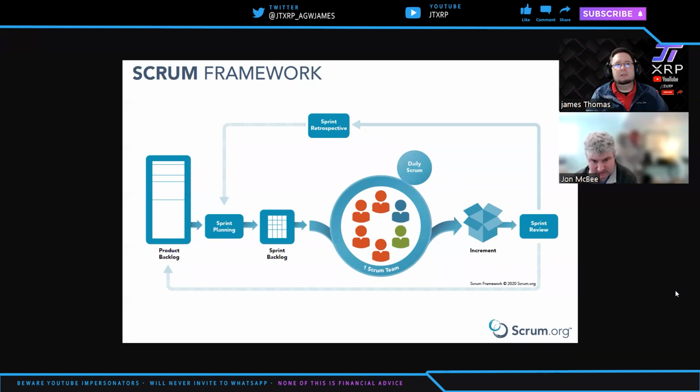After the sprints, we have a meeting where we'll do demos. They'll show me working code. Then I can take those demos and show them to the DAO. So I'm the one that's actually showing the working code to the DAO itself. So I'm kind of abstracting away all of the development from the DAO itself. We do a retrospective, decide if things need to be changed. So what worked well, what didn't work well, how can we make the process better? Then we go for the next sprint. The tricky parts tend to be the time between sprints. And the dev team side obviously doesn't want any gap because they want to keep that work flowing.